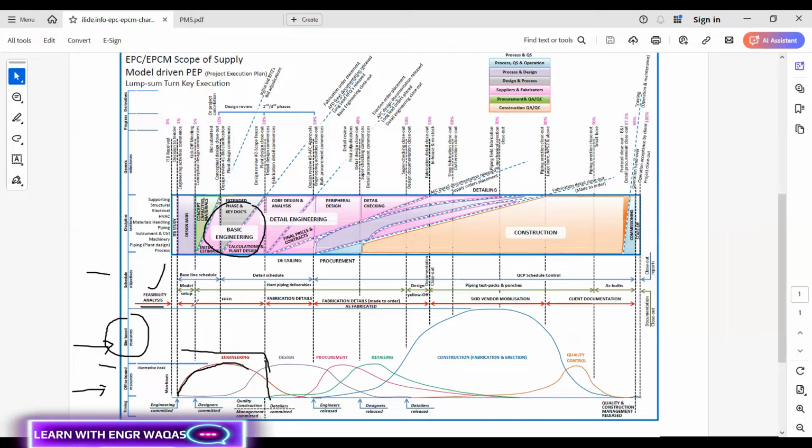If feasibility is yes, you are going to proceed with your project with an authorizing document like a project charter. After that, you are going to conduct invitation to bid, right? You are going to invite different kinds of contractors out there in the market to compete in that bidding, so that one of those contractors or service companies is going to win that project. So see, everything is overlapped.